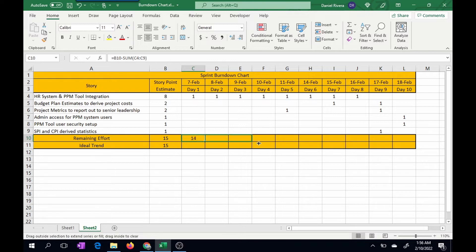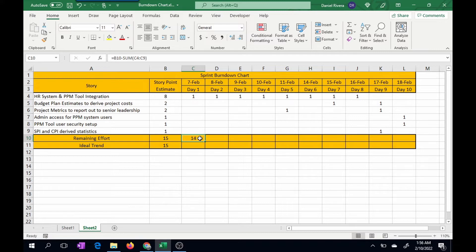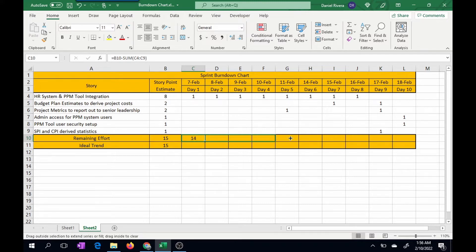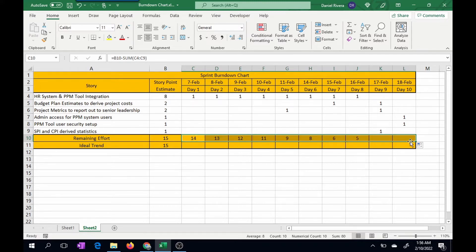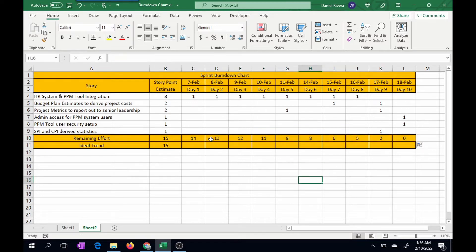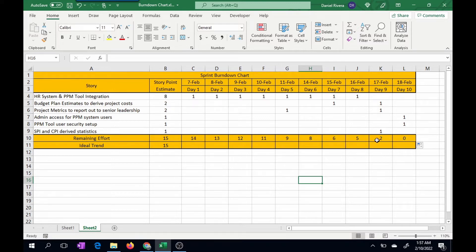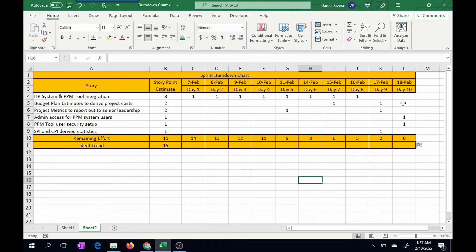So we're seeing that this is accurate. We started with a 15 point story sprint estimate. One story was implemented, so now we're down to 14 story points remaining. So if I just click, I'm clicking the handle. If you're in the cell, it's a plus. But if you come down here, the plus changes to a cell handle. And what that does is it'll just copy the formula. If I drag to the right, you'll see that the formula is copied and all of the associated numbers are here.